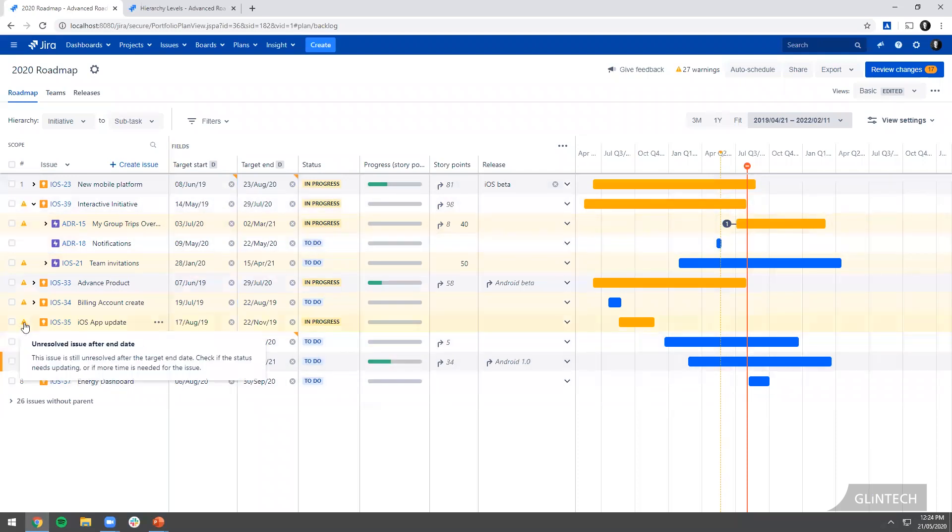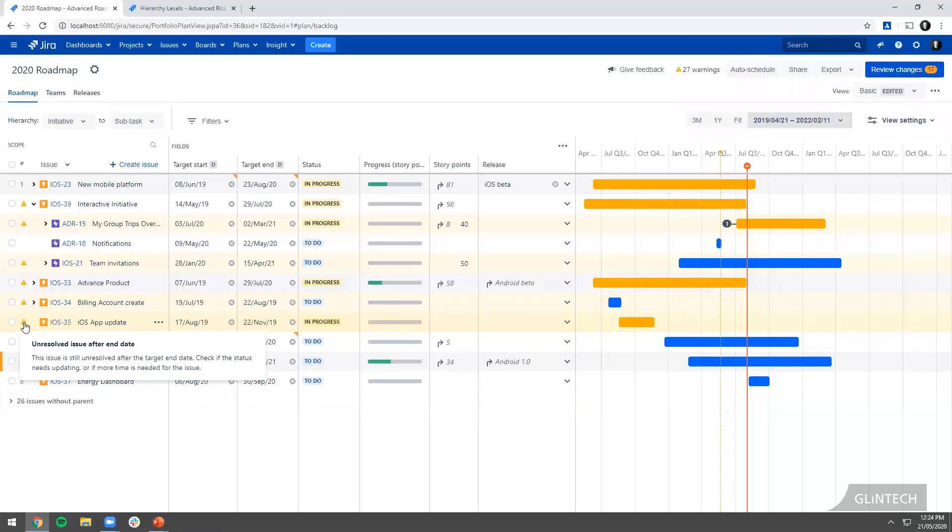Another example here, we have an unresolved issue after the end date. What it's saying is the issue hasn't been resolved yet, it's still open, and yet the target end date is passed. Well those things can't both be true. So it's pointing out and saying you either need to update the target end date or you need to close the issue.